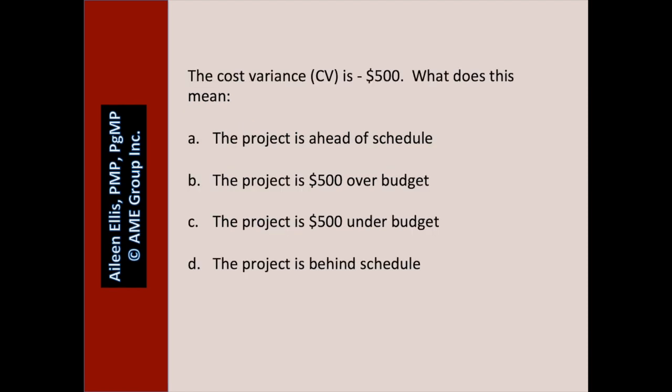Let's look at several sample questions. Cost variance is negative $500. What does this mean? Pause the video and answer the question. The first thing I do is ask: is the question about cost or schedule? And it's about cost. Then I ask: negative $500, is that a good or a bad thing? A negative variance is a bad thing.